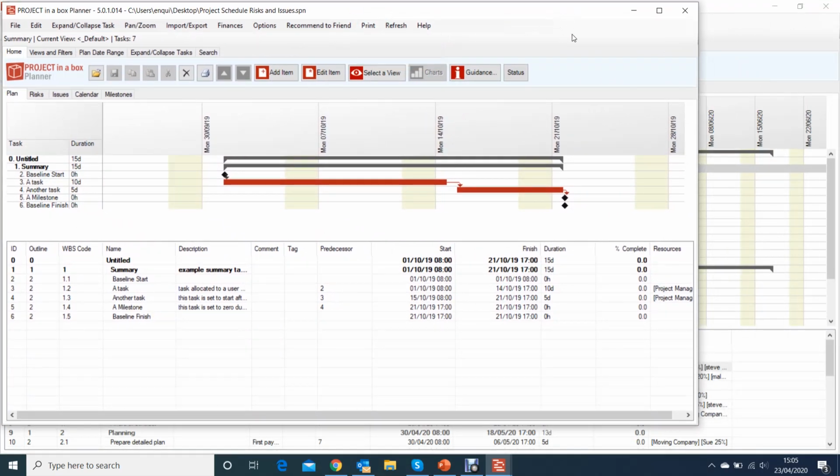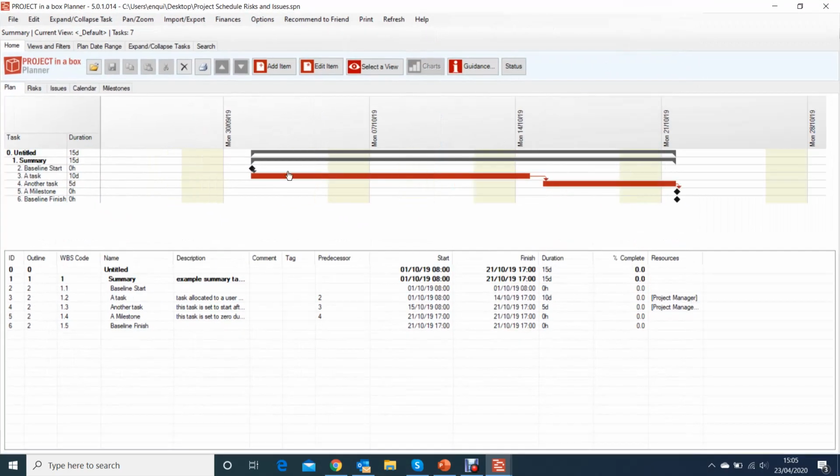It's very simple. It's just reminding us of the sort of things that we can do with Planner: summary groups, milestones, dependencies, pre-populated with some descriptions, pre-populated with some resources, as I've mentioned before. And you can take that model and take it further. So if your projects always have the same key starting points or approval points to get through a business process, why not build them in? If you've always got the same endpoints for wrapping up and completing a project and signing it off and post-project reviews, etc., put those in as well.